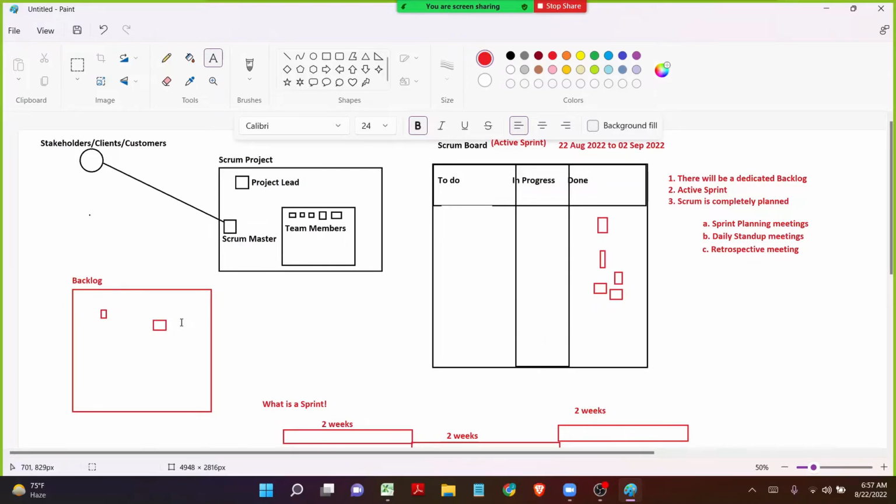And in this particular sprint, one of the issues is not completed for some reason, and we have thrown it to the backlog. So the stakeholders or the clients will share their feedback, and the scrum master will take it and apply it from the next sprints. And even in the retrospective meeting, the scrum master will take the feedback from all the team members: what challenges they have faced, and what needs to be implemented in the team in order to have good collaboration between the team members.